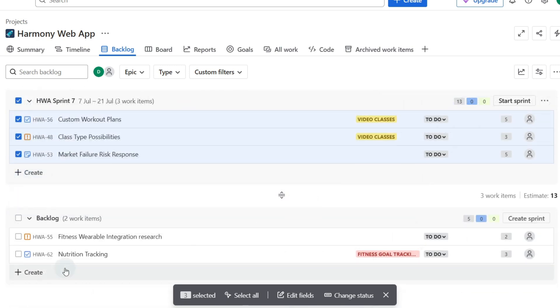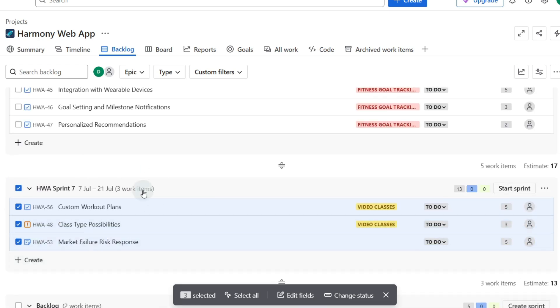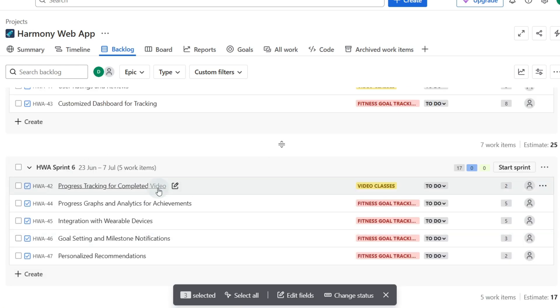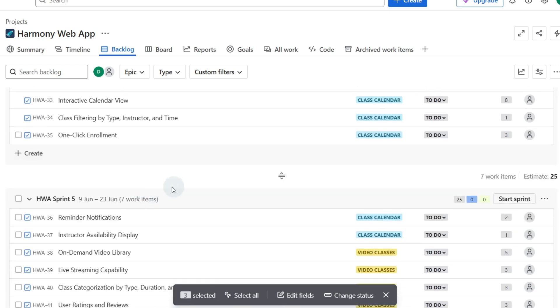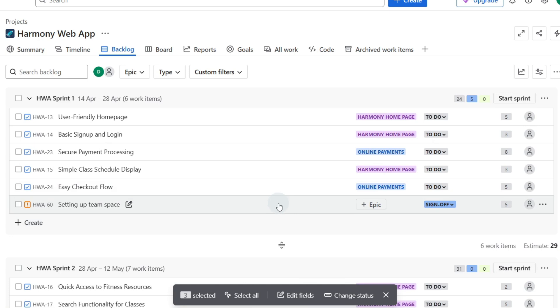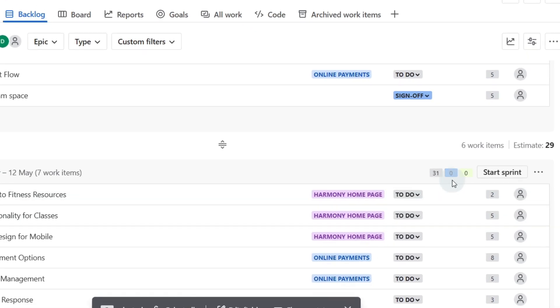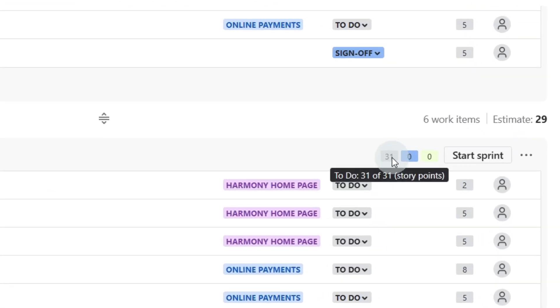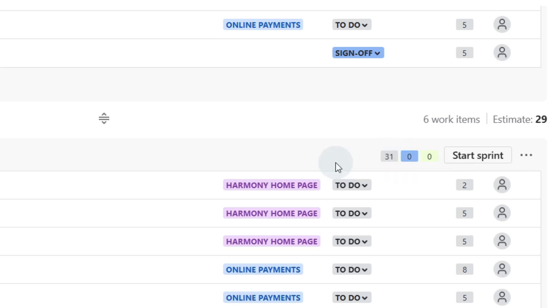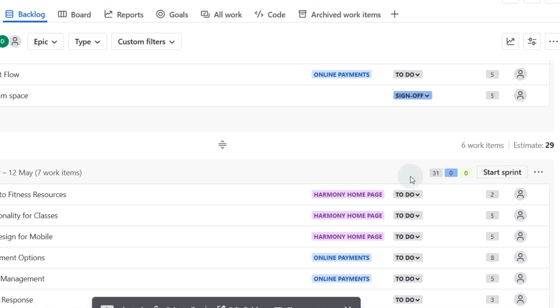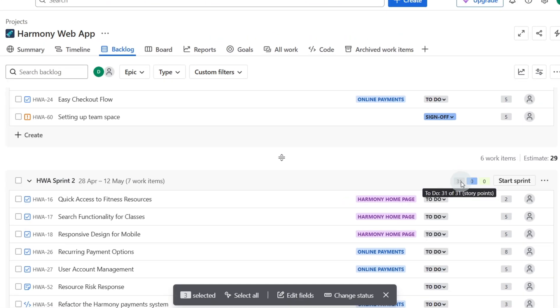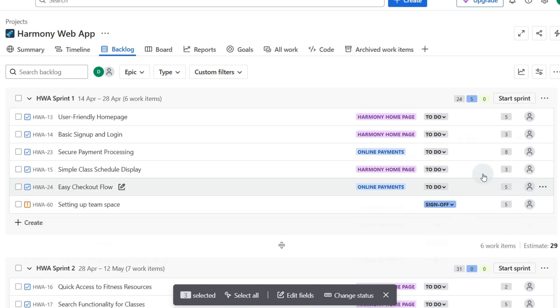Now that we have our items in the backlog and we've got some sprints full of work, one more thing with our backlog that's quite nice to see is the story points. So we can see our velocity, how we're going, and once we've completed a few sprints we can make sure that we're matching our work to our velocity. But in sprint two for example we've got 31 story points, none are in progress and none are done currently.